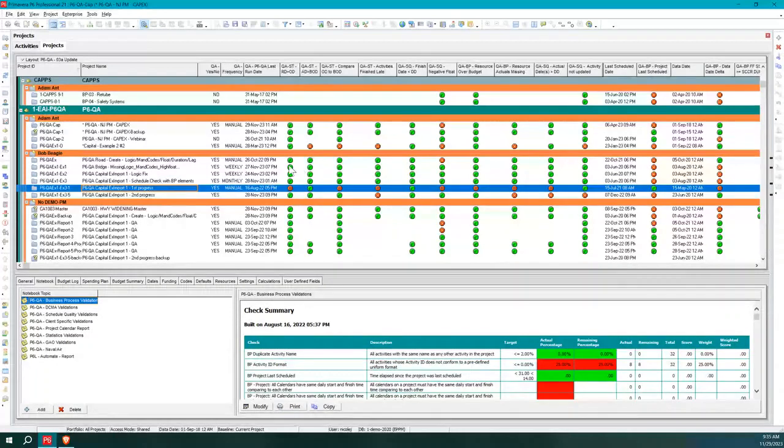So some of the updating things that our clients are looking at, they're looking at durations, okay? So they want to see if the remaining duration has gotten bigger than the original duration. That's an important one. The actual duration, is it bigger than the budgeted original duration? Yes or no? And so on. Okay, so that's what these are for. Are the activities finishing late? Of course, that's a key thing you want to see. So we've got a flag there. So we've got a lot of activities that are going beyond their budgeted finish date, okay, usually from your baseline is what we're using for that, and so on.